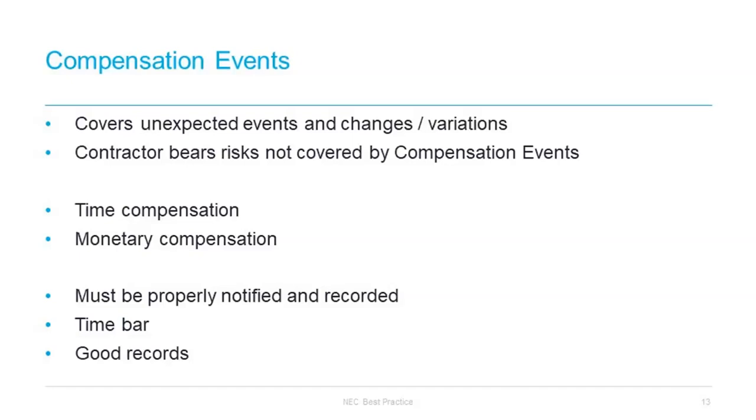Compensation events under NEC also deal with both time and money. And again, that's distinct and different from other contracts, where time and money are usually dealt with separately. Where you have a compensation event which might fall under several categories, there is a risk that the notification will fail if it's notified under the wrong clause.